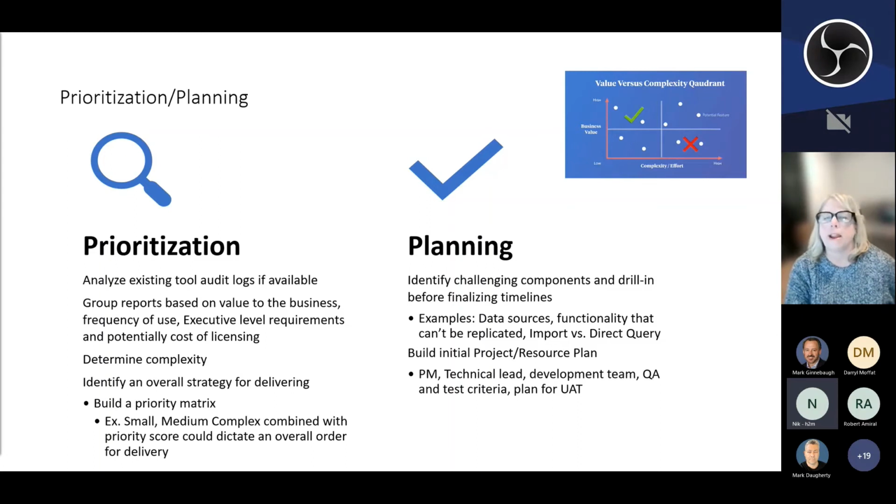So maybe they're my higher priority, but their stuff is maybe in the medium to low complexity. That puts them as a great candidate to be at the top of your list as you make a ranking of how you're going to do things. And then, you're also going to have things that are just obviously high usage but low complexity.